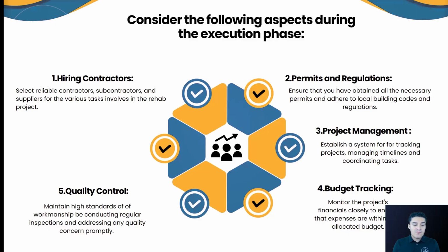So, for example, I'm going to give you an example. I know a lot of people who, because they created strong relationships with their contractors, tell their contractor, this is just an example, you can implement this later however you want to do it: okay, if this project is going to take 4 weeks, I'm going to come here and inspect the property every Friday. Every Friday I'm going to give you a check, right? We divide the process into 4 checks, for example. So I'm going to manage the property every single Friday.